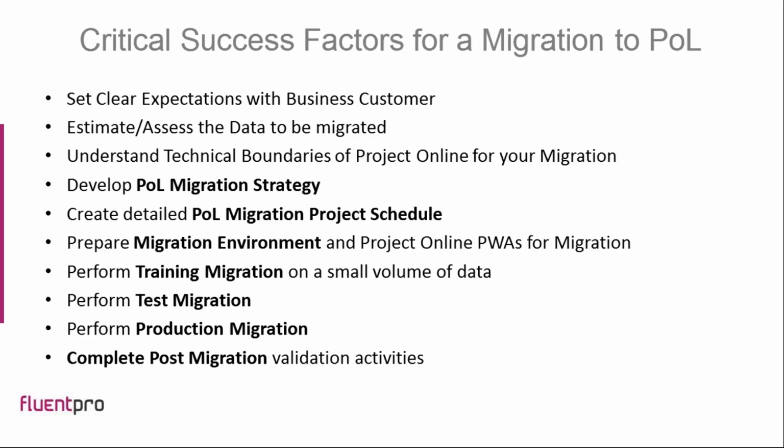So this is something that we recommend that you try to tackle initially. There's a lot of assessment, a lot of planning that needs to go on before you actually commit to a delivery date for a completed Project Online migration. The second, as I said, you have to estimate and assess the data to be migrated, so exactly what's in there. And the more detailed assessment that you can do, the better estimate that you're going to have of duration, and the better test migration that you're probably going to achieve.